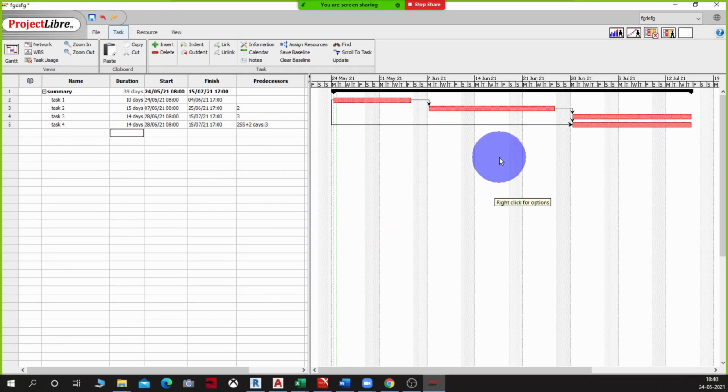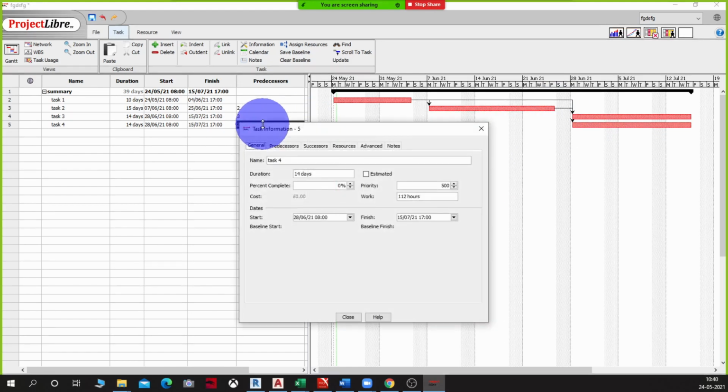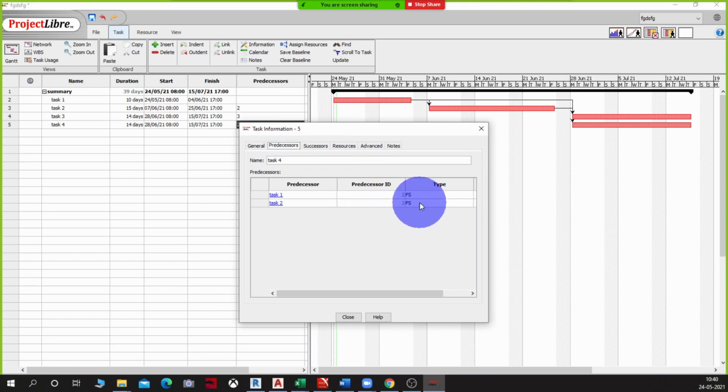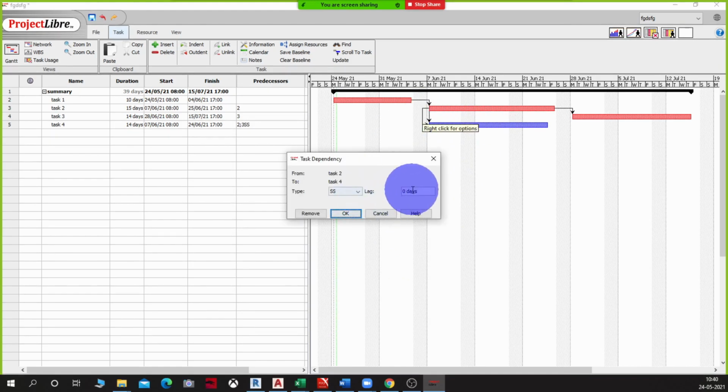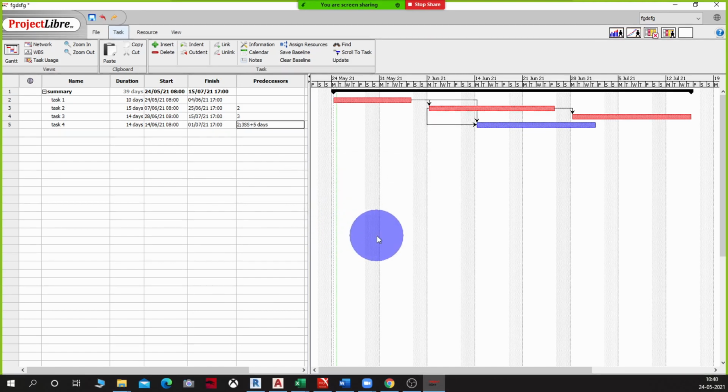Oh sorry, I took the wrong connection. Undo. Let me come to this here, predecessors. I want to make this start to start. Okay, I'm gonna give it a lag of say 5 days. Was it clear what I did just now?